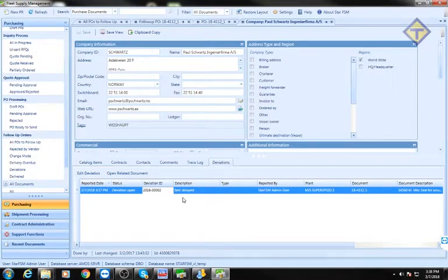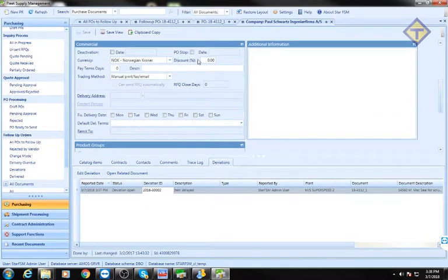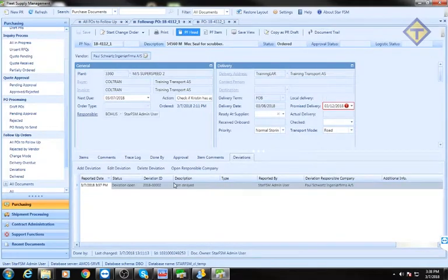So with more than 1 deviation or more than 3 deviations, you have to invite the vendor to talk, to have a meeting. Or with more than 5 deviations, you can just stop creating POs for this vendor. Yeah. Okay, so this is the reason you can use this deviation to register things.